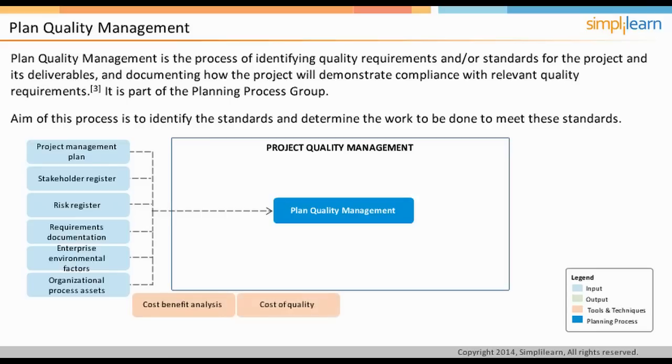Next, identify the cost of quality and confirm if that kind of investment in quality is justified. In addition to these two, benchmarking helps in analyzing the quality of activities of similar projects executed in the past. This helps in identifying the particular quality of output of the previous project, which in turn acts as a basis for the current project's quality planning.